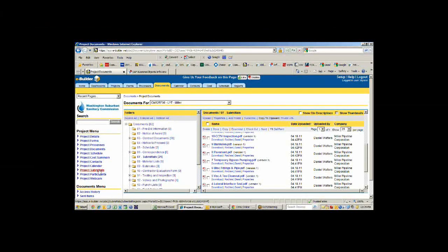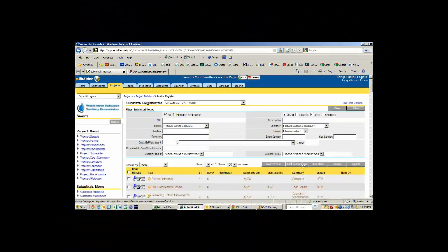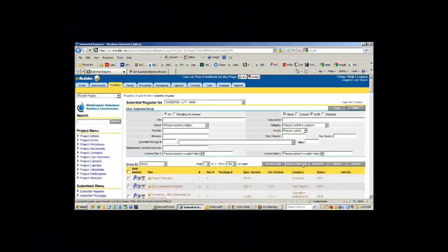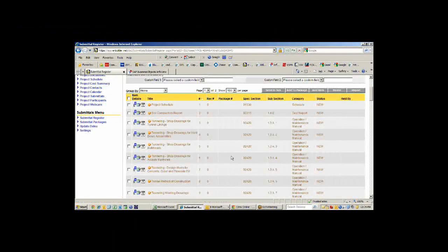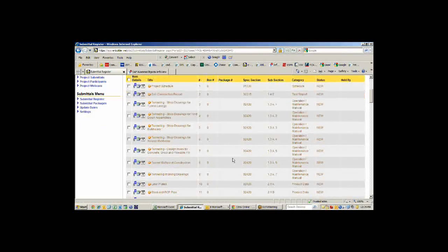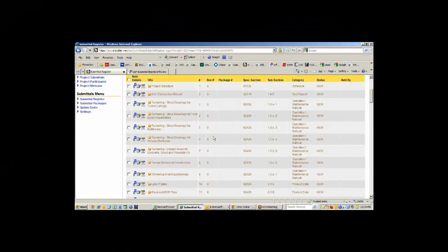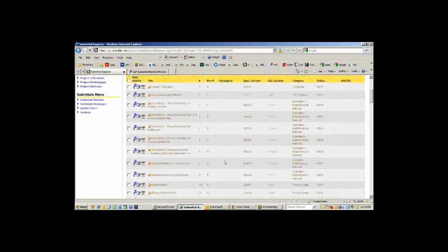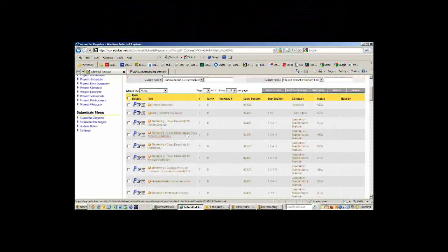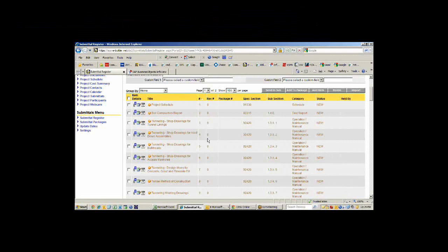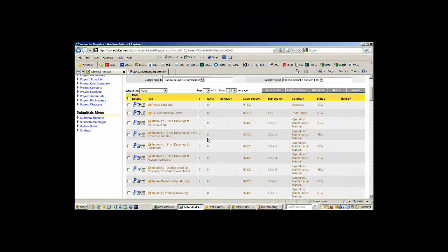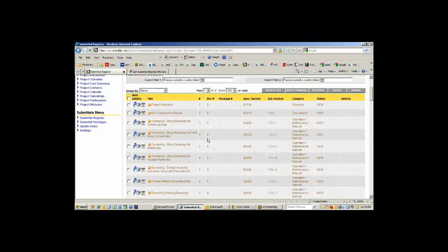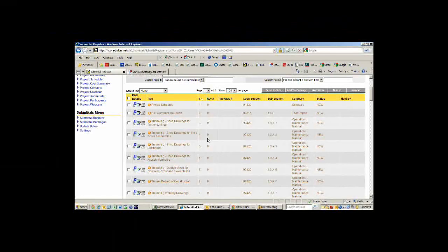If I jump down to submittals, we can see that we have a list of submittals. This is our standard list of submittals that's required for all contracts. Each one of these would be filled out by the contractor, they would attach the documents here, and submit that to the contract manager for review. He would then either approve it or send it out to the engineer internally or externally to review and approve.